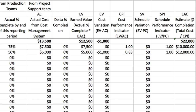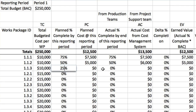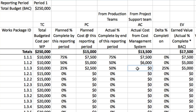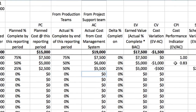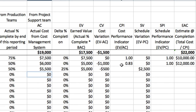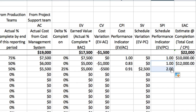Work package 1.1.3 shows that the planned completion is 25%, but we've actually completed 50% — ahead of schedule, well done. Even better, the actual costs are not much more than the earned value: actual cost is $5,500 and earned value is $5,000, giving a cost variance of $500. The CPI is slightly below one at 0.91, but within our tolerance level, and the SPI is above one, so we are ahead of schedule.